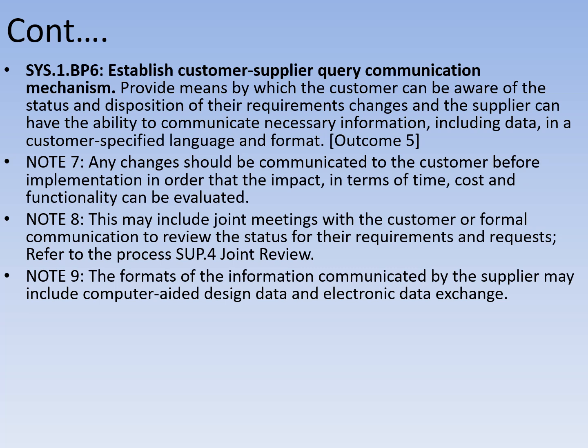These changes can be proposed not only by the customer, but also by the supplier. If the supplier comes forward to make a particular change, it should be informed to the customer, and the impact in terms of time and cost should be clearly communicated, so that the customer is clear about the implications of your change.